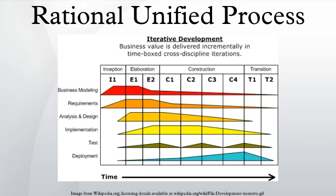Transition Phase: The primary objective is to transition the system from development into production, making it available to and understood by the end user. The activities of this phase include training the end users and maintainers, and beta testing the system to validate it against end user expectations. The product is also checked against the quality level set in the inception phase. If all objectives are met, the product release milestone is reached and the development cycle is finished.